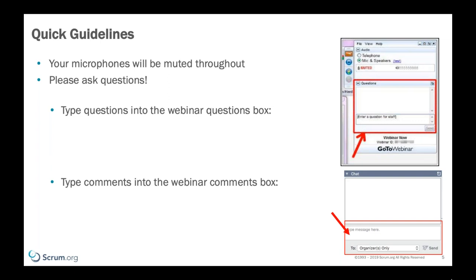It has to happen just in time, not too late. So making sure that you have the things ready for that moment in time. And I think for UX, just as the other disciplines, there's kind of two parts to that work. There's the work that occurs in sprint with the engineering team for the current sprint. And then you've got refinement, which happens all the time. So the development team should be constantly doing a refinement of the things that are coming up in the future.